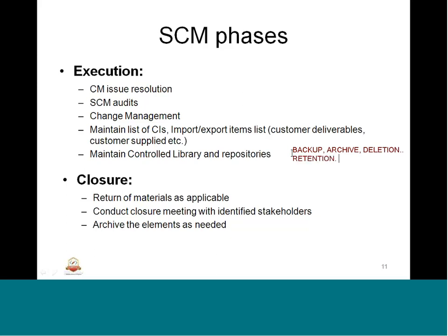Basically, there is a term called retention. There is a retention period. Any project is supposed to have a retention period. Why? Because it may go for a callback, or a rollover, or need to be maintained again, triggered from customer input or internal input, or any maintenance or warranty or guarantee, whatever is required. Till that period, retention has to be taken care of. So all this will be part of the execution that is defined in the SCM plan. This is an important SCM phase.